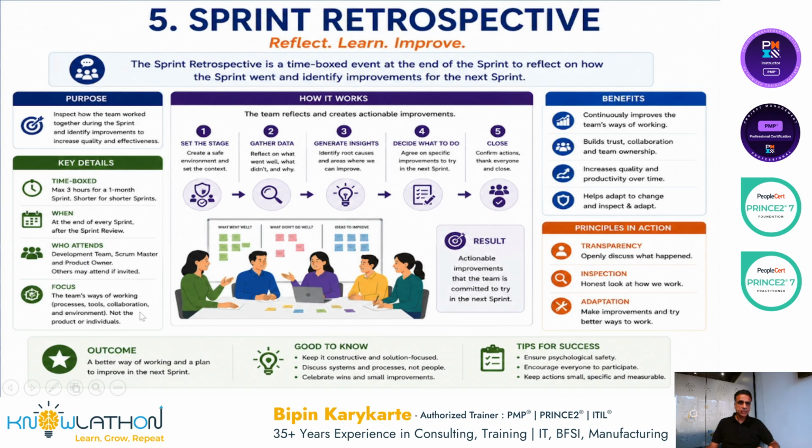The focus is on the team's ways of working, processes, tools, collaboration and environment, and not the product or the individuals. Basically, the idea is to find out what can be improved, not that people need to be improved. That is not the focus. Set the stage to create a safe environment and see the context, gather data, reflect on what went well, what didn't and why, generate insights, and identify the root causes and areas where we can improve.